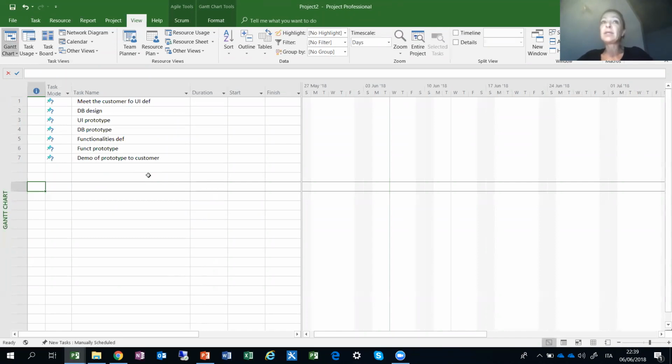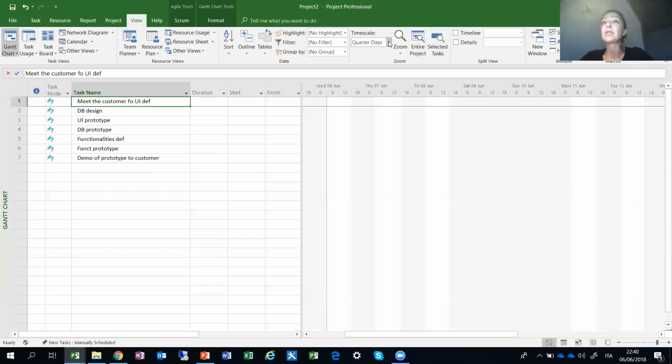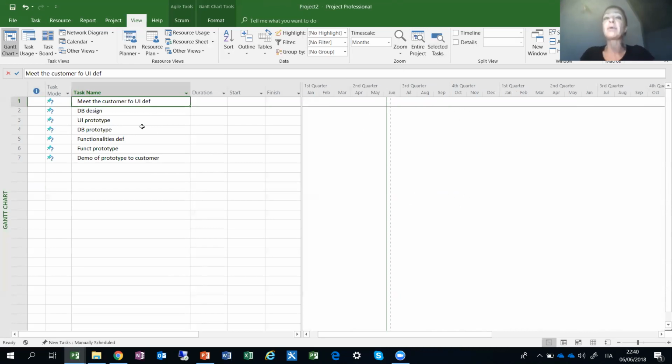Basically, the items that we are viewing in the board are tasks, basic tasks in MS Project traditional view. The tasks in Agile are planned utilizing, as you can see, the manual task mode. This allows us to move the tasks around and be able to see these tasks. Let me just show you here. Okay, to be able to see the tasks in our list and be able to move them around through the definition of what tasks are next up, what tasks are completed, and so on.